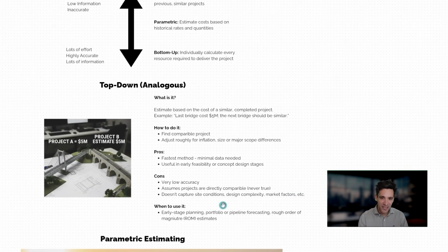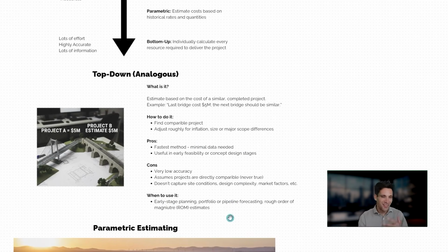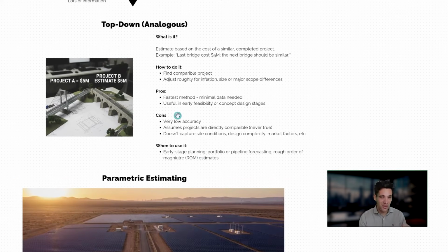It doesn't capture site conditions, design complexity, market factors. Basically, anything specific to the project will not be captured. It will only work if 2 projects are identical, which again is never true. So really, you'd only use this for very early stage planning, or if you're looking at your portfolio or pipeline. Say, for example, you know a certain project's coming up in a year or 2, and you want to map out your potential forecast revenue. That is really the only reason you would ever use this.